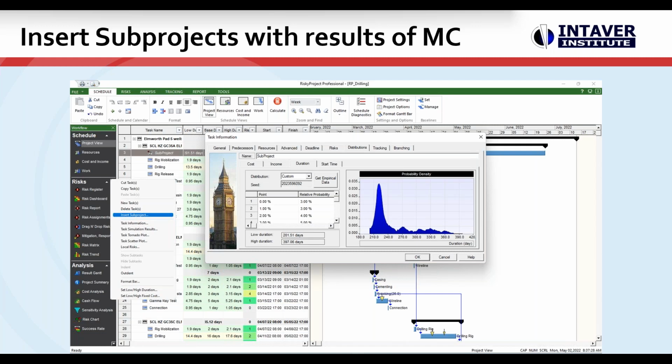And again, one of the things you're able to do is, from the subprojects, you'll get a better feel for where you're most sensitive. Because when we run on a very large, complex project, it's very hard to get valid sensitivity analysis if you're looking at where the places are to manage your project, because there are so many activities, you get an incredible amount of what I would just call white noise.